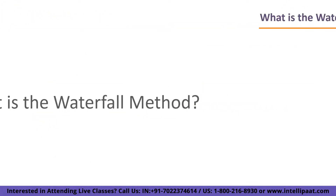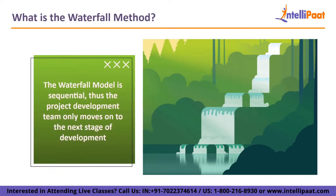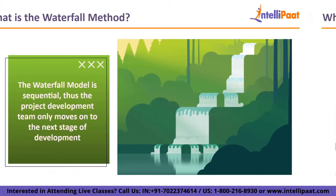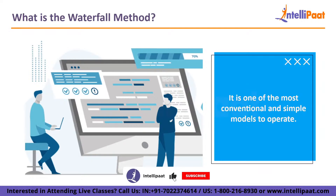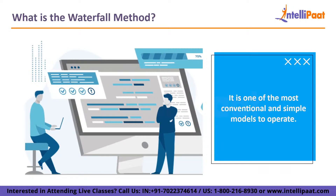The Waterfall method, also known as the Linear Sequential Life Cycle Model, is a modeling technique. The waterfall model is sequential, so the project development team only moves on to the next stage of development or testing when the previous stage has been successfully completed. It is one of the most conventional and simple models to operate. Each phase has particular deliverables and a review procedure. In smaller projects with clearly defined needs, the waterfall model performs well. Development in the waterfall model is viewed as flowing steadily downwards like a cascade, which is why it is called the waterfall model.